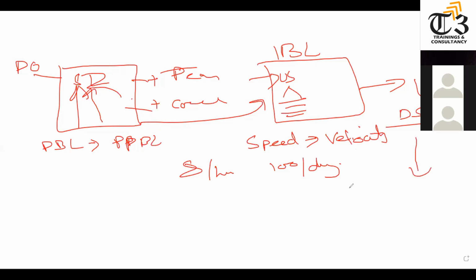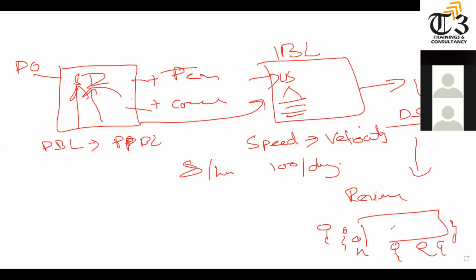Once the iteration is finished, there will be an iteration review meeting, where we have a product owner, could be a sponsor, it could be other stakeholders, our Scrum Master with the team. They will demonstrate the delivery. If the product owner and these people agree, then this will be shipped according to the initial release schedule, which was defined at the time of the project charter.